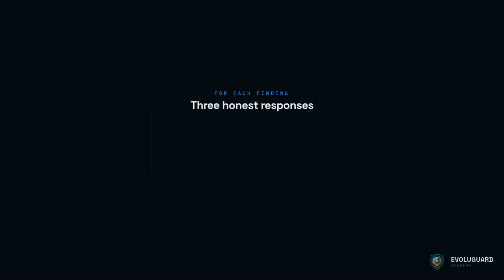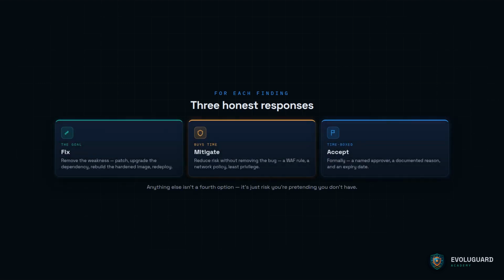You've got your shortlist. For each finding, there are exactly 3 honest responses: fix it, mitigate it, or formally accept it. Anything else, ignoring it, losing it in a backlog, isn't a fourth option. It's just risk you're pretending you don't have. Let's take the three in turn.